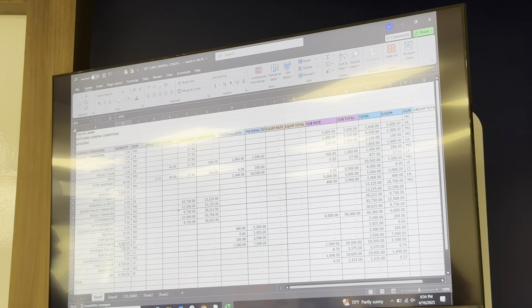Power, you will need to take off the area of the building. Toilets, you're gonna have a bit of a line. Nobody likes you if you have a line at the porta-john, so you probably need more than 2. Temporary roads, that won't be enough money. You need to include more for a job that size. Intermediate cleanup, just based off schedule would be okay. Update your final cleanup. Dumpsters should be about right, just update your duration, and then update the size of the area of the building for billing.